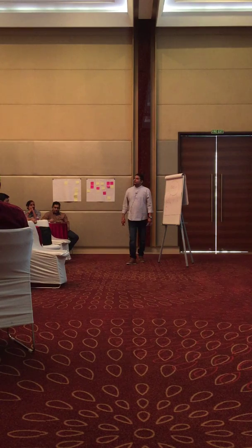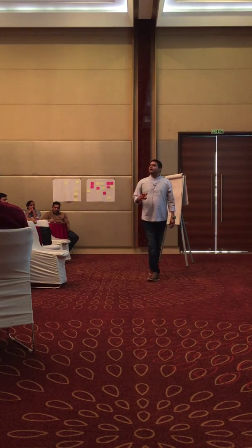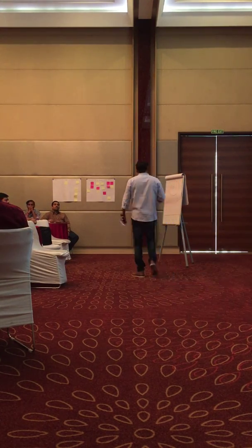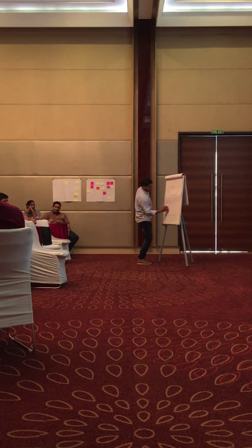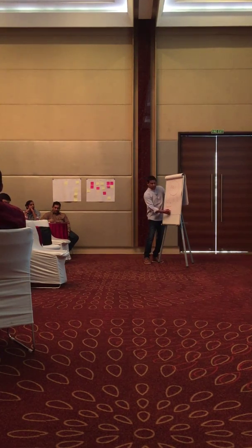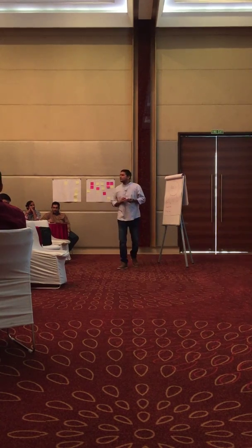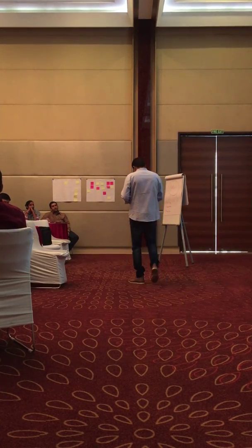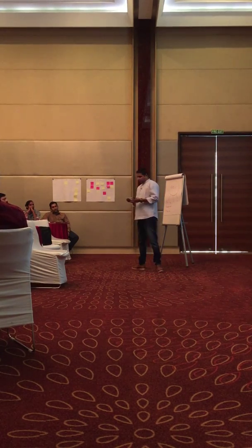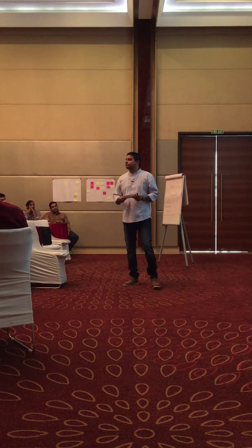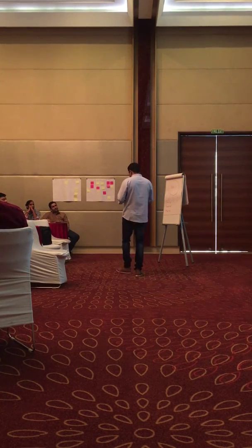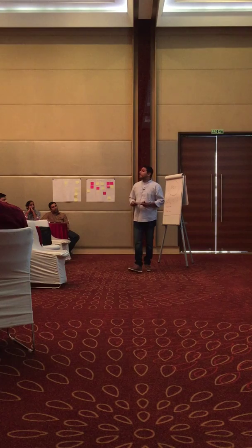Because the story that you have implemented in sprint 1 may get a defect in sprint 3. So obviously that should be given a little more priority. Then present needs. Future enhancements may be related to infrastructural enhancements or technical architectural designs related things, right? So these are the items. Good. Next one: each product backlog item has a description, value, estimation and order associated with it. True. Good. Higher order product backlog items are usually clearer and more detailed than lower order backlog items.